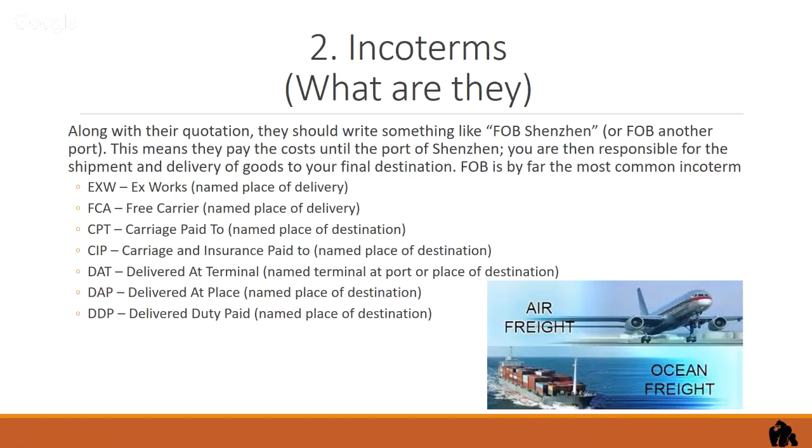FCA is a free carrier. Okay, you name the place and delivery methodology. And again, they are responsible for producing that product, and then you work with a freight forwarder to do everything else. And the same with these, I'm not going to go into details, but the ones that we're interested in, guys, is FOB generally, or Ex Works if you're working with a slightly larger product, or you're ordering container loads at a time, ask for Ex Works. Okay, the others out, I'll let you have a look at them.